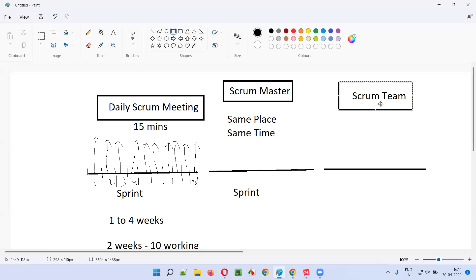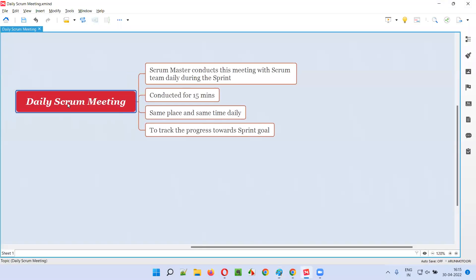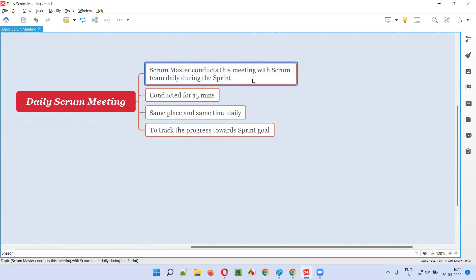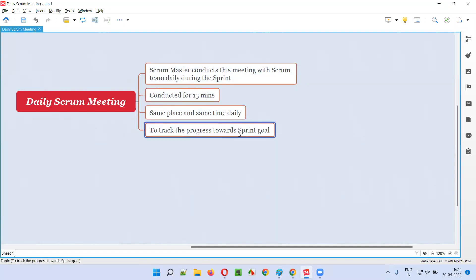The scrum master asks each scrum team member to share the status of their work — what has been completed, what is pending, what is planned for tomorrow, and whether the team is on track as per the sprint goal. The key focus is whether the work can be completed by the end of the sprint. This meeting should not take more than 15 minutes.